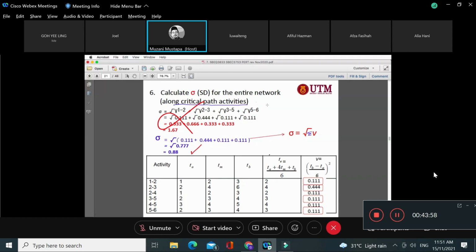Because if a non-critical activity has float, it means it can be one or two days late, no problem. It will not affect the whole project duration. But for the critical path, you take that particular route or line because you don't want the slowest time to be missed; this is the expected. So you have already calculated the TE on the entire network critical path, right? So that's why you only take the critical line only, right?